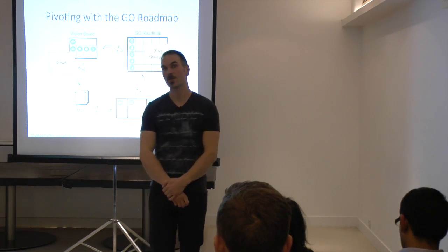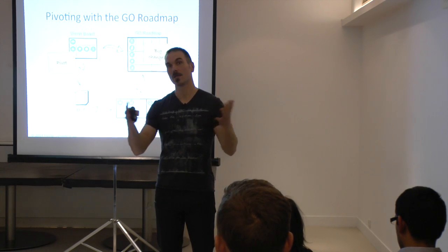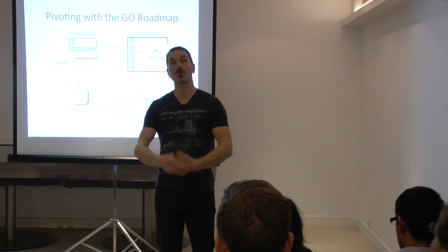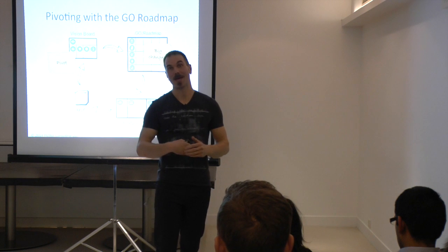It will be a similar thing if you find that you have to carry out some major architectural refactoring for a specific release. I don't know, you've got so much spaghetti code now in your software that it's time to carry out some bigger maintenance work that may significantly impact an entire release, an entire 2 to 3 months time frame. And again, that's something I would make explicit in the roadmap. So the goal wouldn't then be to acquire new users or activate users. I mean, it's in a way a retention-related goal, I'd say, but it's really about carrying out those refactorings.